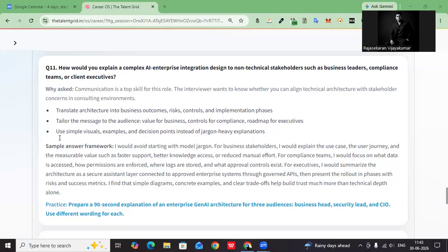When it comes to development, I will define each stage. The design part involves requirement gathering. Responsible for requirement gathering will be the business analyst. Accountable is his counterpart, his leader, who checks whether the business analyst is effectively doing the design or not. Consulted will be the business stakeholders, because the business analyst has to work closely with them. Informed will be the business stakeholders.